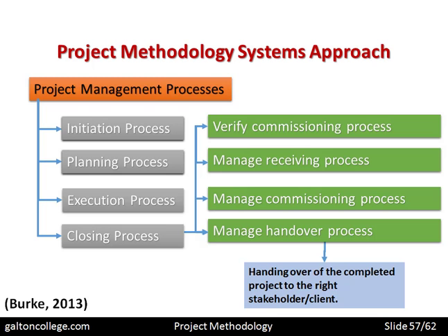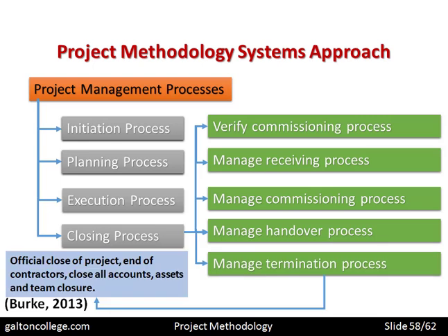Make sure that there is clarity about all of the issues, that there is good communications with the stakeholder, that they understand what was involved, they have an opportunity to question the project manager, they have an opportunity to perhaps trial run the project with the involvement of the project manager, so that it's tested before their eyes, and then at that stage the handover is complete.